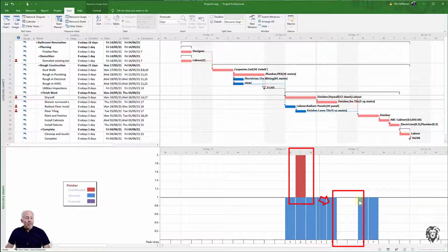Now, we have this space below the line here, but when I look up on my schedule, I see that's a Saturday, Sunday. So that's normally non-working time. So I could do that. I could still drop it in below the line there, but the only way I would be able to do that is if I approved overtime for that task. And depending on the importance of any project delay or anything else, that might be exactly the choice that I have to do.